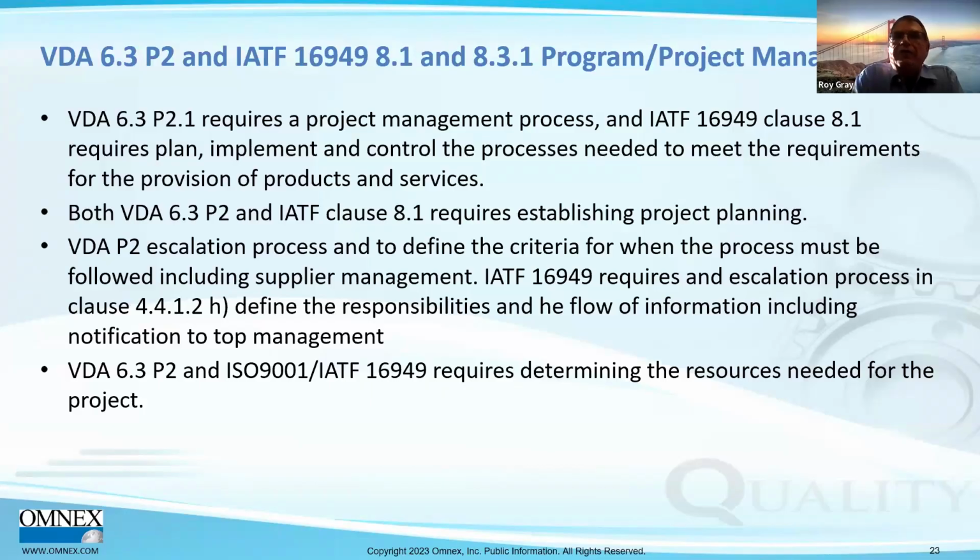And this plan is going to cover all the customer milestones that we have to meet. So we're looking for a timeline of when these milestones are supposed to be hit. Also looking for gate reviews and design reviews in there, making sure it's all complete.